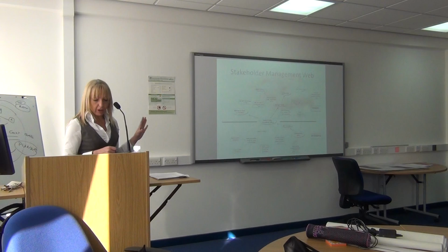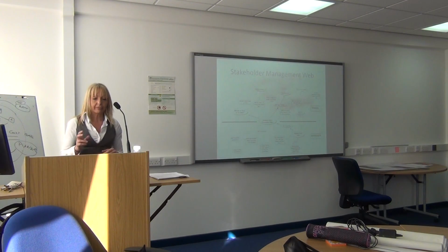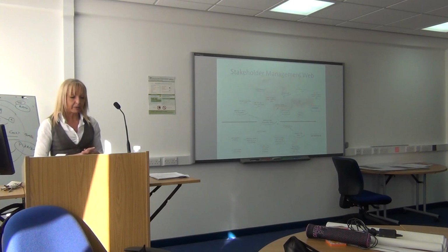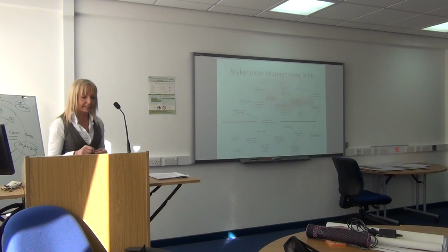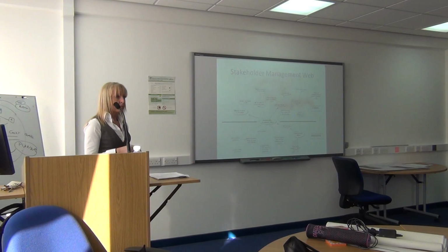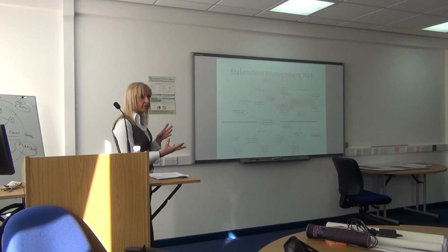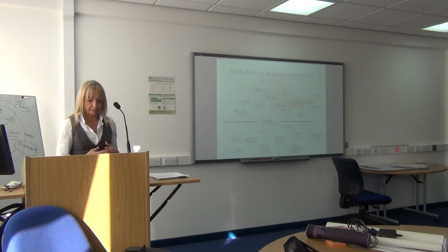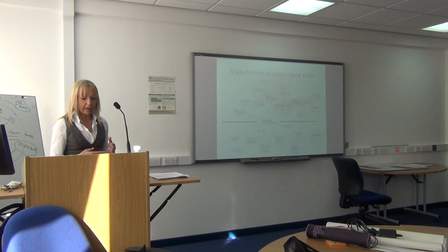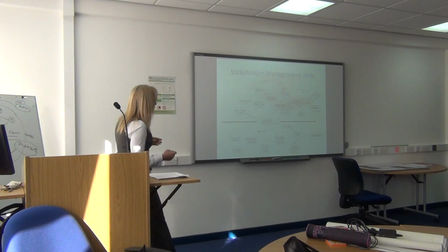So as I said before, the oval ones are directly from the stakeholder influence network and indicate those parts of the network the focal stakeholder uses as basis of its power. So they use these people as part of their power. It's more evident as to who their network influences are. Similarly, the thin lines are the causal links.